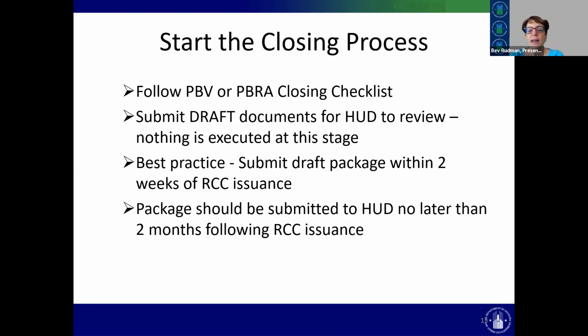Okay, so as I said, best practice is you're really ready when the RCC comes out, you send us your package. We do understand that's not always possible, so we try to say, can you get us a package within 2 months. The RCC is good for 90 days. We do entertain extensions, but honestly, our goal is that everything would be done within 90 days and you've closed, and we can go on to the next people who need our help.